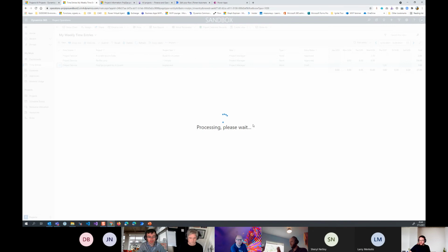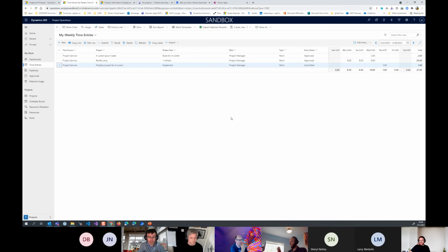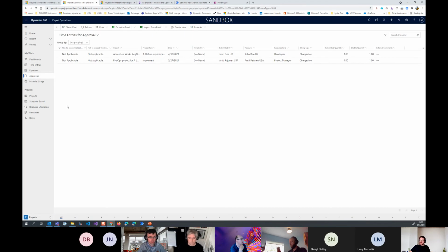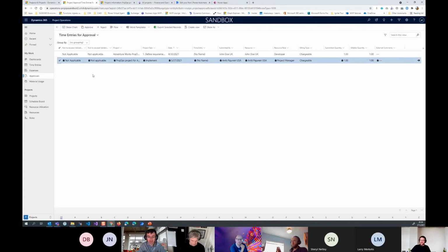So what happens next is the next step in the process. Submitted time needs to be approved. Maybe a bit ironically, in this case, I'm also the approver because I'm the PM. But you get the idea. John Doe as a consultant might log time, and then I would approve that time as a project manager. So on approvals, I'll approve this time entry. I can see that it's chargeable.